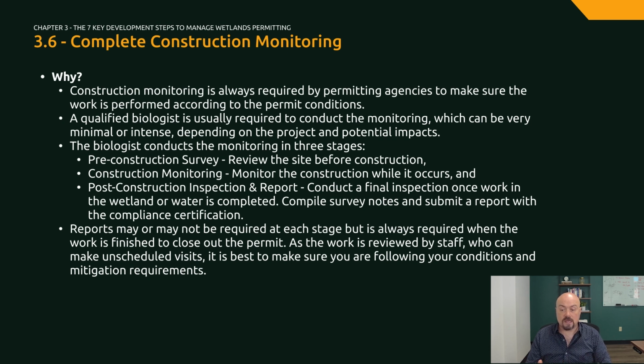The biologist conducts the monitoring in 3 stages. The pre-construction survey is needed to review the site before construction to make sure that there are no special status species present, flag wetland areas, and other permit requirements. Next, depending on how sensitive the area is, construction monitoring may be required to make sure activities do not impact any sensitive areas or hurt or kill a special status species.